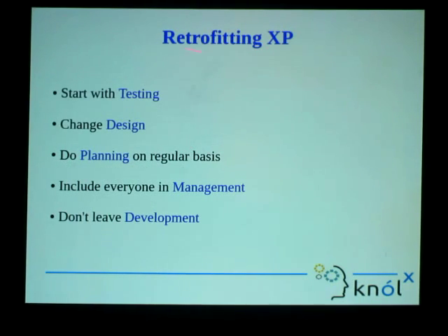Retrofitting XP. That is how to actually fit XP into products which are already going on. First is start with testing. The first thing that we should do for adopting or fitting XP into a current project is start with testing. Then change the design. If your design is not testable, it means we need to change it. Then do planning on a regular basis. Start planning iteratively or regularly.